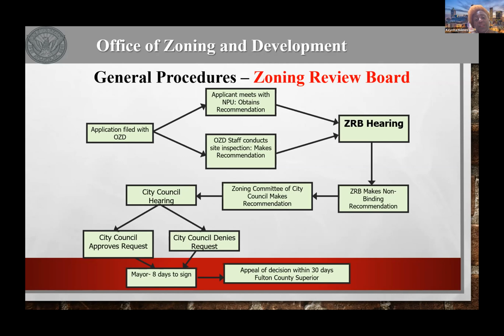So the CRC was established. So CRC, or Concept Review Committee, is required prior to the submittal to the office for the rezoning application. Once the application is submitted, it is processed and I receive a copy of it. The council member of the affected district receives a copy. The MPU chair, the MPU zoning contact, all receive copies of the application, and then all of the review agencies receive a copy of the application.